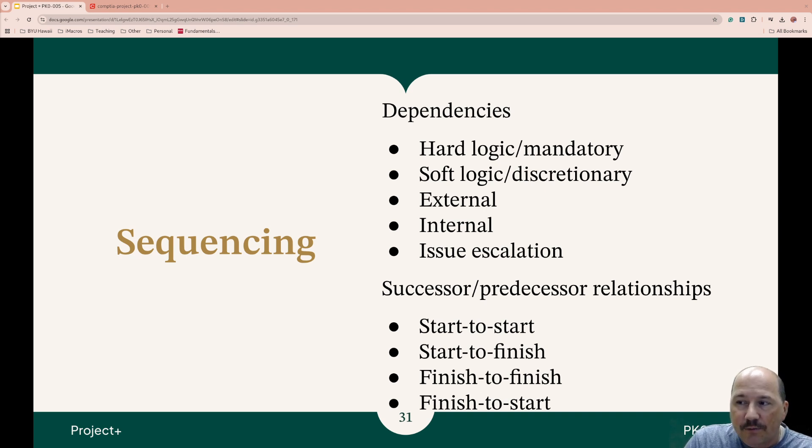Now there are successor-predecessor relationships. Start to start means a successor cannot start until the predecessor has actually started. Start to finish is the successor task cannot finish until the predecessor task has been started. Finish to finish is a successor task cannot start until the predecessor is finished. Finish to start is a successor cannot start until the predecessor task has finished. Just remember the first one is the successor task and the next is the predecessor. So they both have to start. The current task can't start until the last task is finished. Current task can't finish until the last task is finished. Current task can't finish until the predecessor task has started.